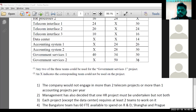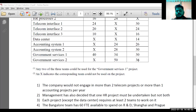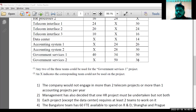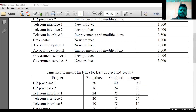One FTE basically mandates how much effort they're going to put on that particular project. Generally we take 150 hours — not every company will take 150 hours, some take 160, some take 120 or 140, but most companies take 150 hours. One FTE means 150 hours, but that is not actually required here.